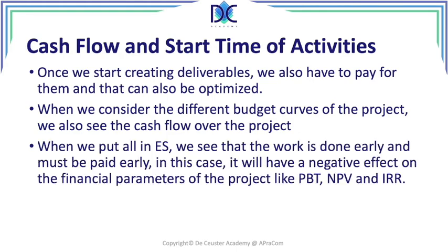We see when we put all the activities in early start, all the work is done early and it must be paid early. And of course, once we have paid it, we have to consider it in our calculations for payback time, net present value, and internal rate of return. So the earlier we pay for the work that we are doing, the more negative the payback time, net present value, and the internal rate of return will be.